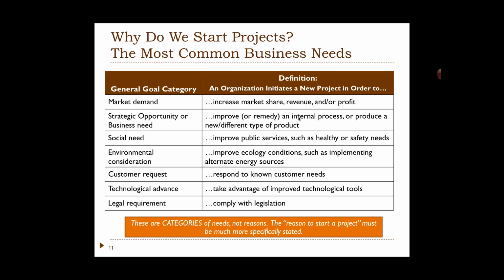If you know what that reason is, it will help you bulletproof your project. Okay? What I mean is, some of you may have worked on projects where somebody comes along when you're halfway through and says, well, we're cutting your funding. And I'm thinking, why are you cutting my funding? Well, if I don't know why we're doing this, if I have no idea where this fits in the organization's strategic objectives or anything of that sort, I don't really have a leg to stand on. Okay, fine. You're taking $100,000 away from my project. At that point, all I can do is say, all right, what don't you want me to do? Which part of this don't you want? Now, normally we don't give that kind of feedback. We just say, okay, fine, I'll do everything, but we'll just make it cheaper, right? Which either means a lot of overtime or it means we're going to drop the level of quality, right?